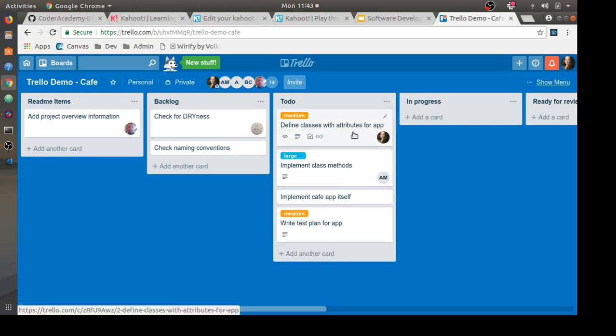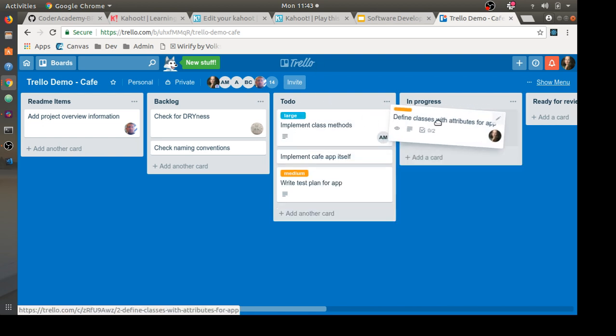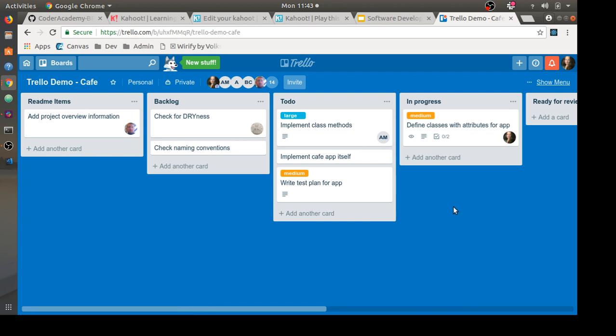And so when I'm ready to work, the way that this should happen, if my Trello board's nicely organized, it's in priority order. So I just look for the thing with my face on it that's closest to the top. And then I take this thing and drag it into in progress. And if I need to make notes on it while I'm working on it, I can do that on the Trello card if I want. Or I can communicate with my partner in Slack, or I can do that communication through GitHub. And one of the things you need to decide as a team is how do we want to communicate with each other about how things are going, and if we need something reviewed.